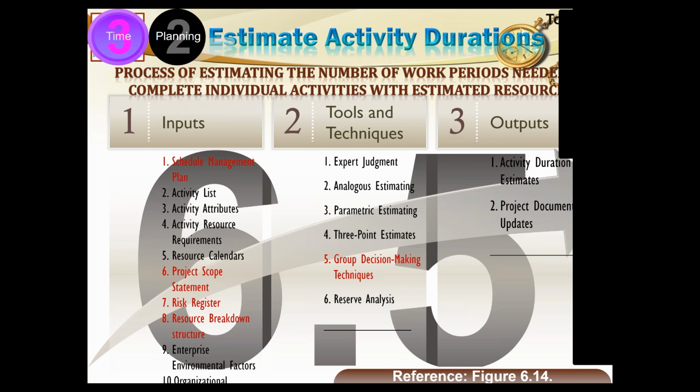There are how many values? How many weightages? No, not 4. We have 4 times weightage to the most likely, 1 time weightage to the pessimist, and 1 time weightage to the optimist. There are a total of 6 weightages. 6 weightages. 3 is for average.